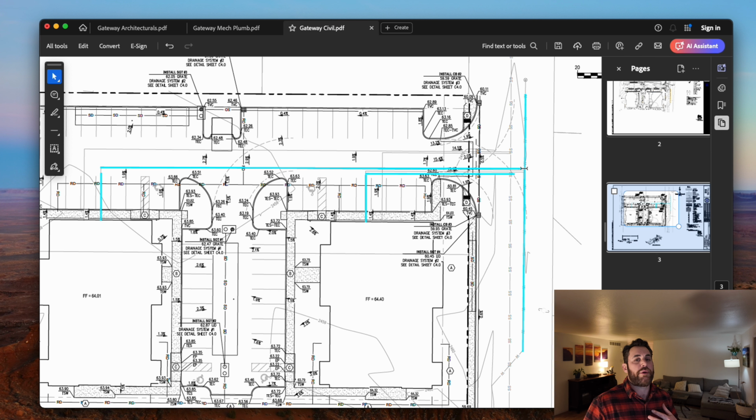So you have to tap in when the water is live. They use a hot tap to do that. I want fewer hot taps because of the risk of the hot tap leaking or something bad happening in that condition, and I want to reduce that. So that would be a question I would have for the designer, but that's not the point of this activity today. So now we can go inside.